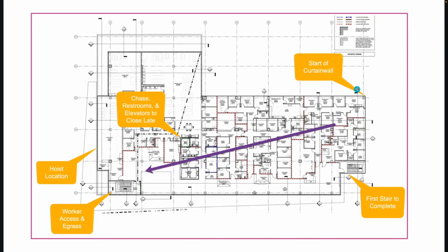If you're going to identify your zones inside the building, what you should do is use your builder knowledge and start to identify what's called constraints. Now, I know you've heard in the lean industry the term constraints in reference to what is normally termed a roadblock, but the real definition of a constraint is something that is constraining you, something that's semi-permanent or permanent.